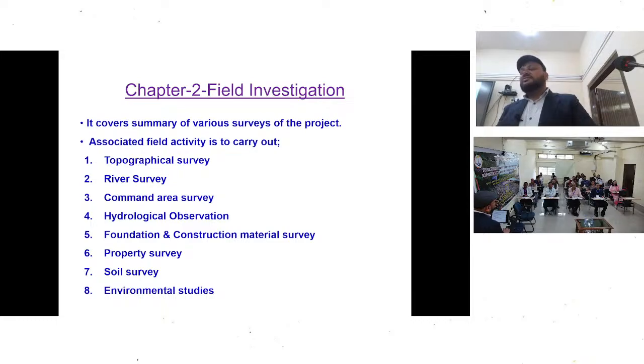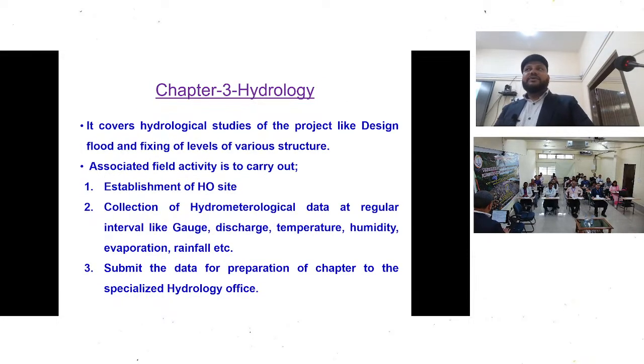Then we start field investigation. It covers basically survey. We do a lot of surveys: topographical survey, river survey, command area survey. There is irrigation component, hydrological observations, foundation and construction material survey, property survey, soil survey, and environmental studies. After that comes hydrology, which has already been covered.